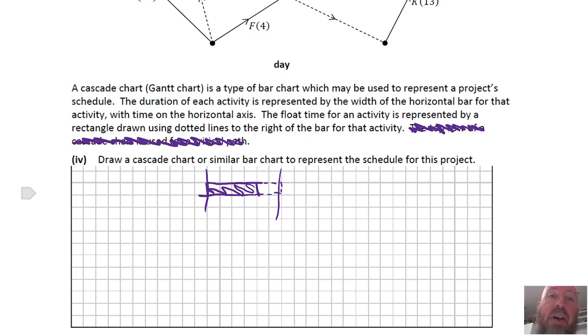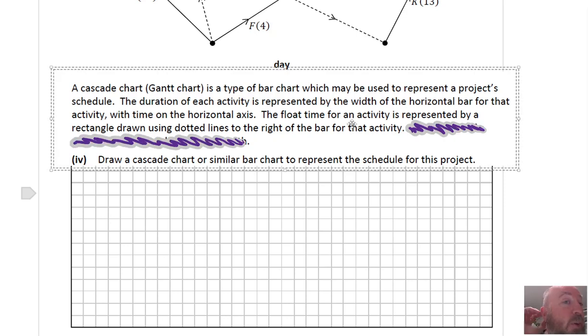We're going to start from the source node and end in the sink node. Very similarly to how we do the early late time thing, we're going to find the early times first and then work backwards to get the late times. And it's nice, the question gives you an instruction how to do that: solid, and then the dotted line for the extra. I presume it's also to do with the requirement to only use black pen, that you can't use color, so don't worry about the thing not being pretty.